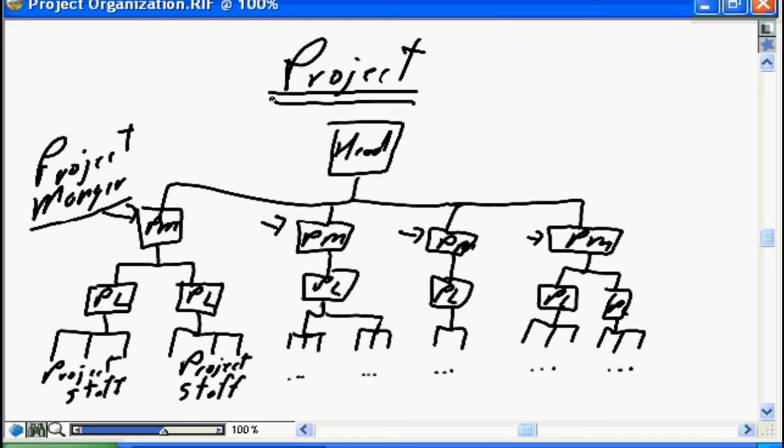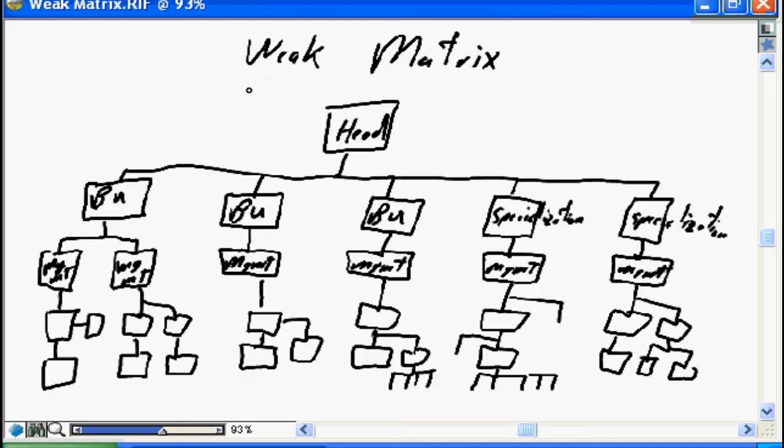As mentioned in the introduction to this nugget, a project organization typically does not exist in a traditional business environment. A project-based organization is traditionally limited to organizations that deliver projects professionally, i.e. consulting firms and other organizations that do project-based work on contract basis for organizations. And because their focus is on project delivery is what allows them to have dedicated project managers and dedicated team members whose only focus is on the actual delivery of the project itself.